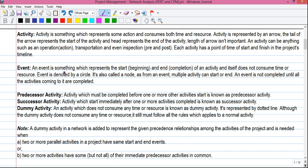Now we will talk about activity, event, and the types of activities. An activity is something which represents some action and consumes both time and resource. Activity is represented by an arrow — the tail of the arrow represents the start of the activity and the head represents the end of the activity. The length of the arrow is not important. An activity can be anything such as an operation, an action, transportation, or even inspection.